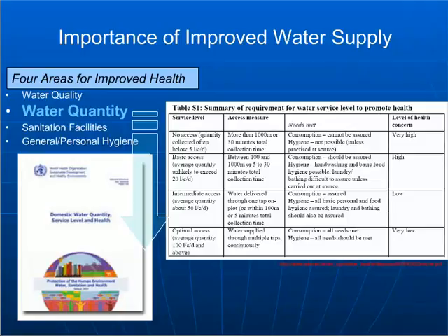And so it's important to remember that as far as developing the scope or deciding on the scope of a particular EWB project, you're typically going to want to be moving from one of these service levels to the next one up. It's very unlikely that you're going to be able to design a system, construct a system, and maintain a system that brings a community from no access all the way up to optimal access in the period of time that EWB projects typically run.